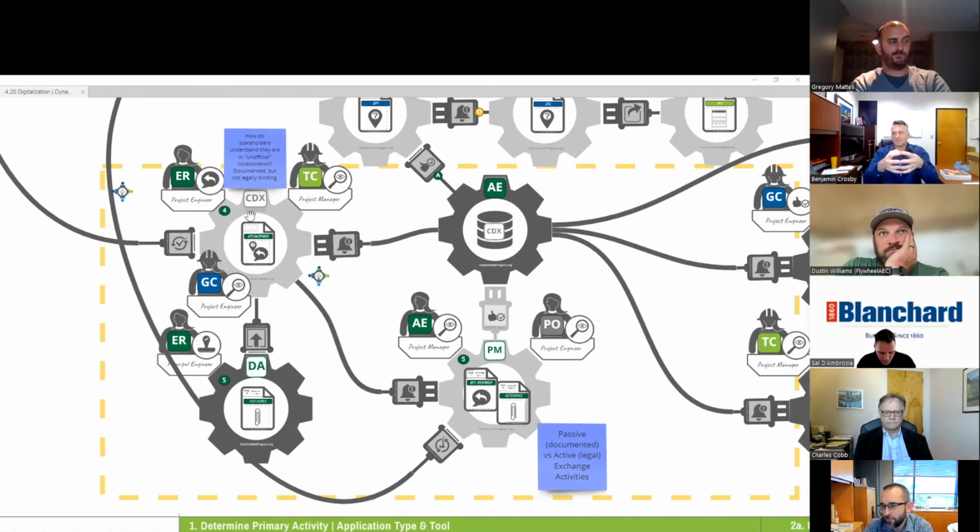Yeah. If everybody saw it happen, there's a record of it that anybody can access, then we're good. We're creating some transparency. We still have the same assignment of risk, right? The architect is the engineer of record, the architect of record. They have to answer some of that. There's legal obligation there to do that, and so there is risk assigned to them. There's risk defined by how we perform it. That never really changes, even when we have all these informal conversations. What the informal conversations do is actually reduce the total amount of risk because we're getting better answers. And some people have a hard time seeing that. I think it takes a map sometimes like this to just show them this is how we do it now. Makes a lot of sense.